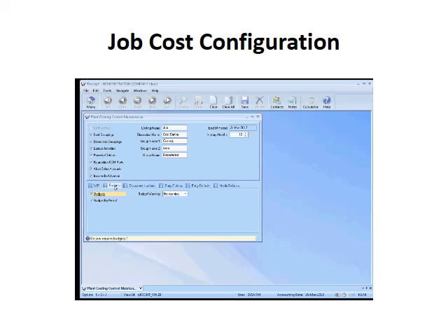We can have budgets on jobs, and we can budget by period. So a job budget will allow you to have a whole budget for the whole of the job, or you can say, I will only have it on for the period. So this way I can say I've got 12 periods per year, and I can then split my budget out into periods. I can also have the system giving me warnings should I exceed budgets based on my charge or actual figures, or give no warnings.